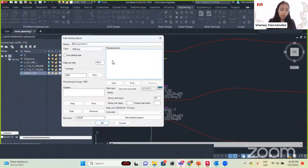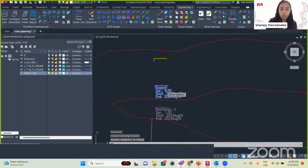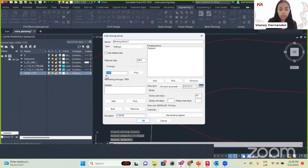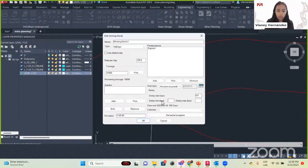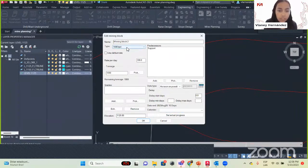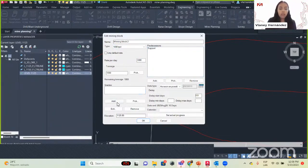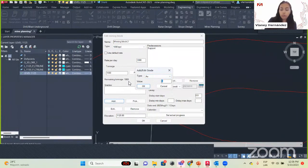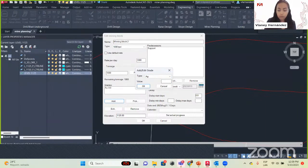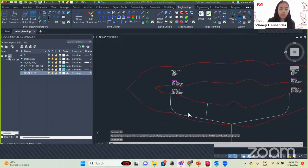We will insert Mining Block 2. The predecessor is going to be our support. The tonnage is 10,000 — change the rate per day to 1,000 — so it will be done in 10 days. For grades: gold will be 8 grams per tonne, silver will be 25 grams per tonne. Click OK and here we have our second mining block. That is our tasks and mining blocks.